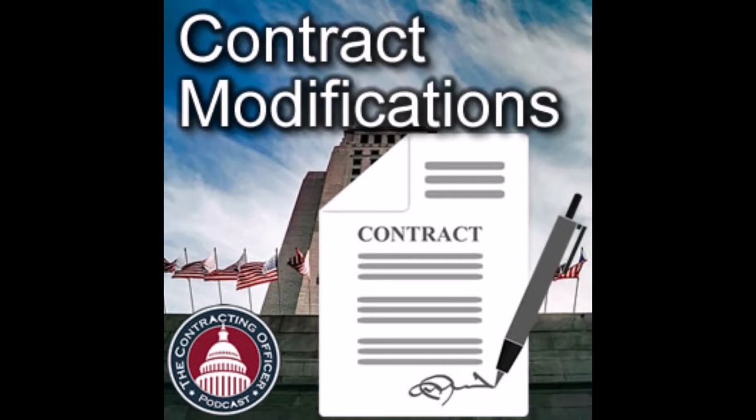I think negotiating a change is something we should all expect, but I'm not sure we're planning for it. Not all of the players are planning for it. The contracting officer, once you've gone through this a few times, goes, of course we're going to have mods, but make sure you educate your customer on that. The finance folks, the program manager, and the user all need to understand that mods don't just happen, and both sides have approval processes. There is a certain level; for example, at Special Operations Command, I could sign a mod on my own, I think, if memory serves, up to like $1 million. I didn't have to have a lawyer look at it, right?